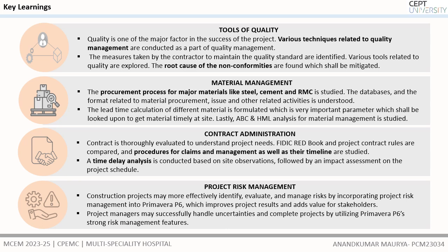In material management, the procurement process for all major materials like steel, cement, and RMC is studied. The database and the formats related to material procurement, issue, and other related activities are understood. The lead time calculation for the different materials is formulated, which is a very important parameter that shall be looked upon to get the material timely at the site. Lastly, ABC and HML analysis for material management is studied.